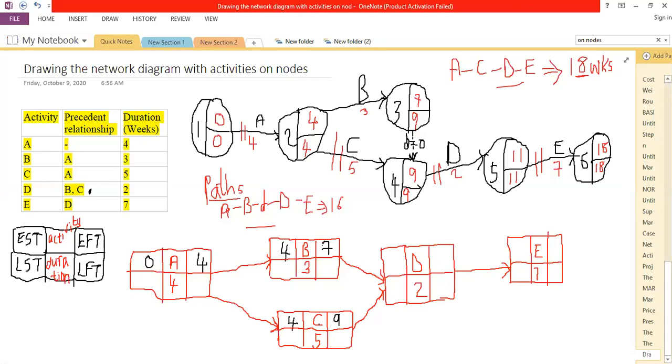In another, shorter way, I would say for any point of comparison you reach, push the largest value that you'll have as you make your comparison. Between 7 and 9, 9 will be our largest figure. We go for it. D has to wait for C no matter how early we'll have completed B. Okay.